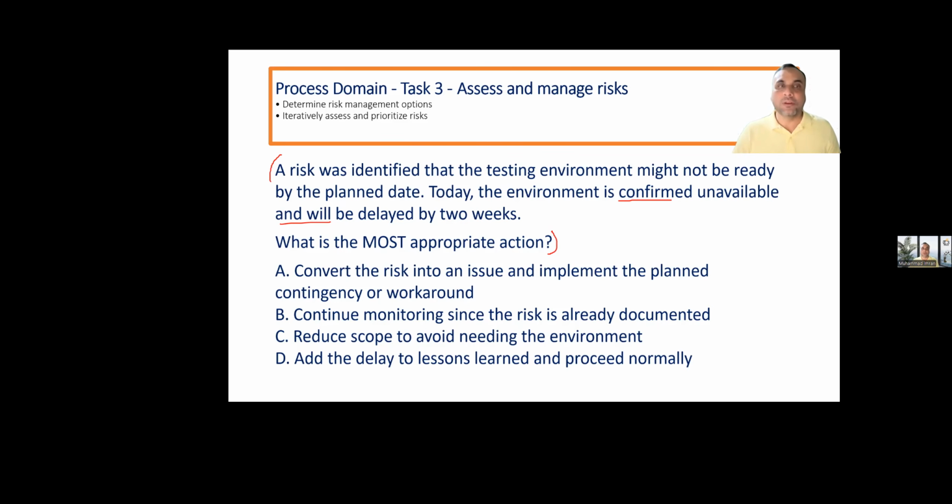A risk was identified that the environment will not be ready by the planned date. Today, it is confirmed that it's not going to be ready. So what has just happened? Risk is verified. It has become an issue.